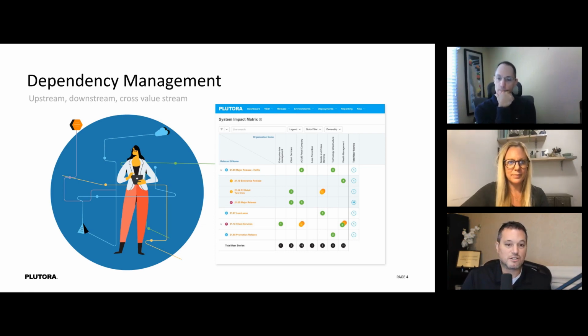You're going to see direct code impact, meaning, hey, this release is actually making changes to these components, and I know that there's an impact there, and so I've got to do something with that dependency. There might also be where I know that I'm changing an upstream system, and all the downstreams have, in essence, a regression dependency, meaning I've got to make sure it didn't break me. It didn't have any big code impact, but I still want to make sure that, the Hippocratic Oath, I haven't blown anything up. So you'll see those in yellow. So the green are the code, the yellow are the regression.